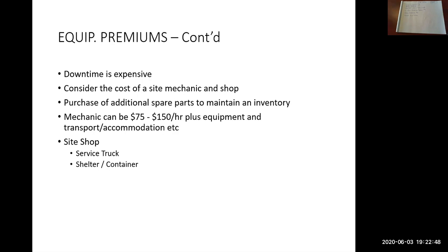Well, you're still down for 2 days, even though it's an easy fix. So possibly the full-time cost of a mechanic is less than those potential downtimes of your crew. You need to look at both sides of the coin and determine which one you want to take the risk on.